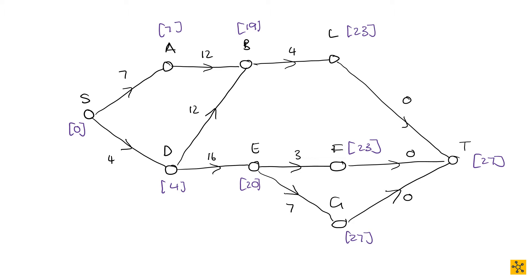So we're going to have T here, and we're going to say the earliest starting time of T is going to be T minus the time it takes to actually complete task T. So we have 27 minus 0, and we have 27 minus 0, and we have 27 minus 0. And then we're going to take the minimum of any of those three. All of them are equal to 27, so we know that the latest start time for T is 27.